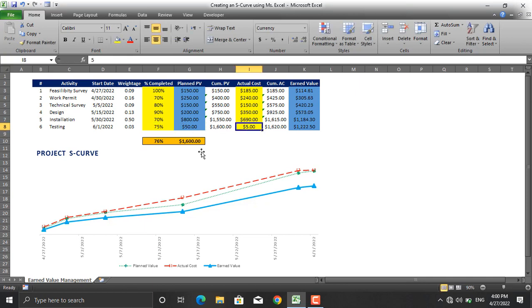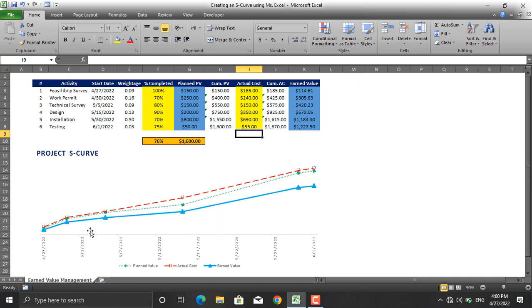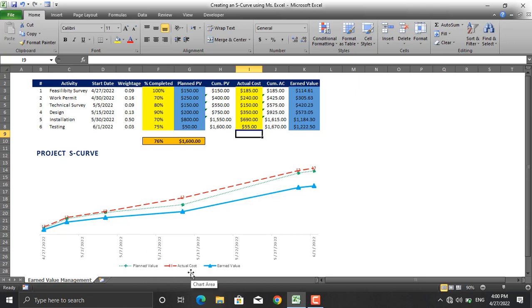As you can see the S-curve moves. The dotted green line is the planned value, the red dashed line is the actual cost, and the blue line is the earned value. Based on this diagram we can judge that the project is at a very bad condition.